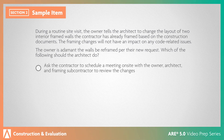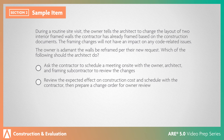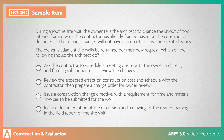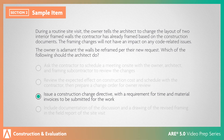The answer choices are: ask the contractor to schedule a meeting on site with the owner, architect, and framing subcontractor to review the changes; review the expected effect on construction costs and schedule with the contractor, then prepare a change order for owner review; issue a construction change directive with the requirement for time and material invoices to be submitted for the work; or include documentation of the discussion and a drawing of the revised framing in the field report of the site visit. The correct answer: per AIA Document A201-2007, General Conditions of the Contract for Construction, a construction change directive is appropriate when a change must take place regardless of time or cost impacts.